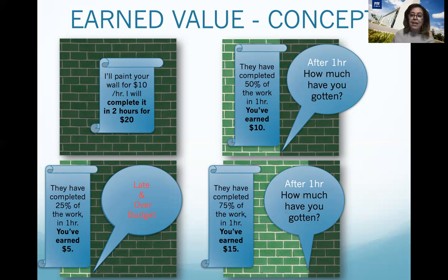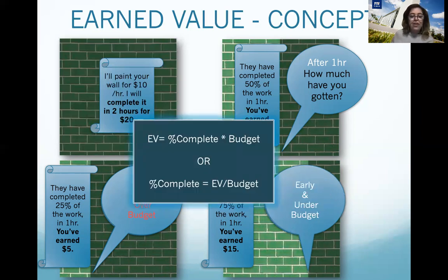Having said that, we can define the earned value. We can represent the earned value using this equation: earned value equals percentage complete times the budget.